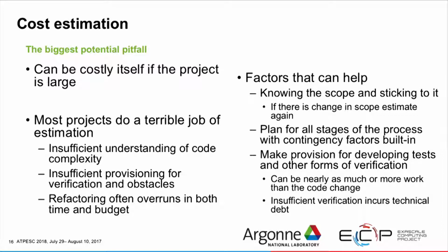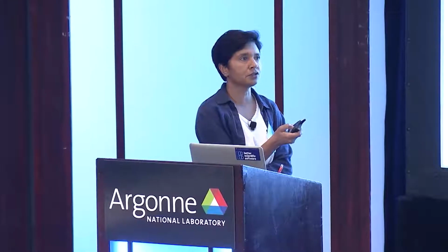It's absolutely essential to make provision for developing tests and other forms of verification. It is very much possible that the effort required to develop the tests and verification regime is as much work as the code itself. In fact, Jared will attest to the fact that in the process of moving from Flash 4 to Flash 5, the development of tests initially took a much longer time than the actual code modifications, right? Right.